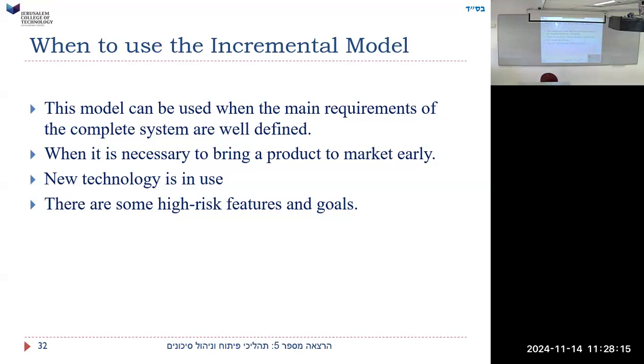I think because if new technology is in use, then we want to use that technology and make sure we understand how it works, make sure we can get it working. We'll use that technology, get the first installment ready, and that works. So now we've mastered the new technology, now we can go on to the other parts. We want to find a small part of the program where we can make sure the technology integrates with what we're doing, and then become an expert in that new technology on one part of the system.